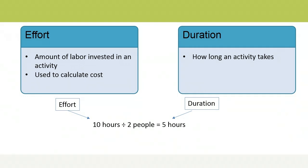Unloading a truck has a duration of 5 hours if two people are used as the resource. The effort in this case is 10 hours, or the total number of billable hours. The effort is not affected by the duration or the number of resources applied. If it's one person, the effort is 10 man-hours. If it's two people, the effort is still 10 man-hours — 5 hours times 2 people.